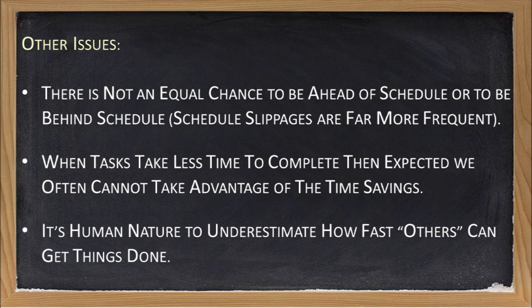And while it is also likely that a task might be completed late, it is not really that unusual for that task to be completed really late. A number of reasons exist for this. The simplest one is to acknowledge that it is human nature not to finish tasks early. If you give someone additional time to complete a task, then they will most likely place a lower priority on that task and shift their focus to some other task that has a more pressing deadline. And as such, we need a model that reflects this reality.